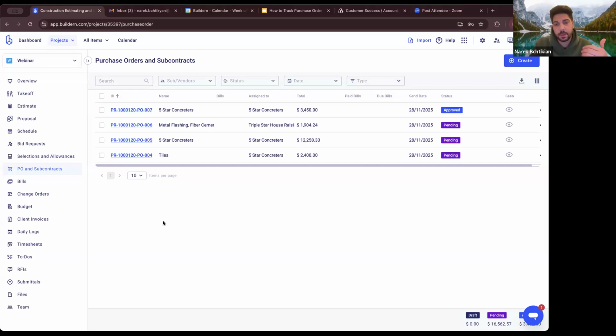You could use the assembly when you're creating your estimate, right? Name the assembly like the name of the wall, and then under that, create the materials that you need and their quantities. And when you create a purchase order, instead of checking the items, just check the entire assembly and then bring that over to the purchase order. Then in that situation, not only you, but also your vendor will have exactly all the details regarding what exactly we need and how much we need for the wall.